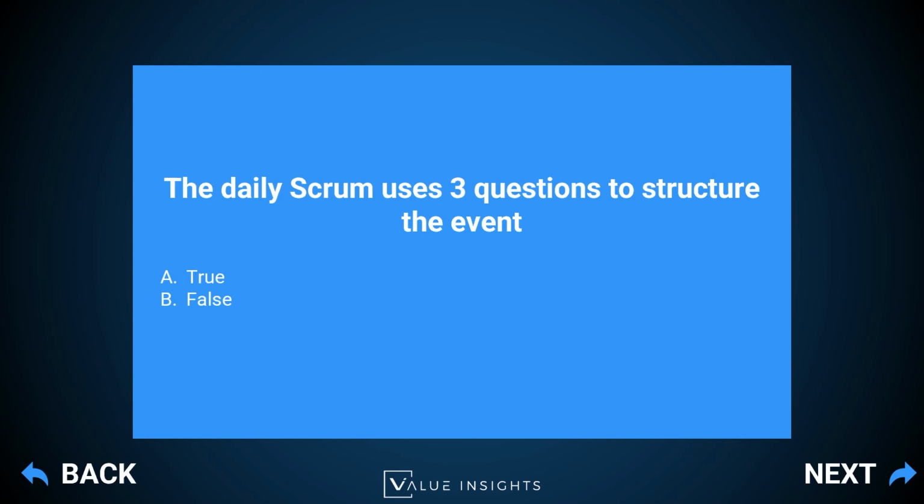Actually, in the latest version of the Scrum Guide, those questions do not appear. They were there previously, but now they are not in anymore. So therefore, the daily Scrum does not necessarily use those 3 questions to structure the event. So this is a false statement.